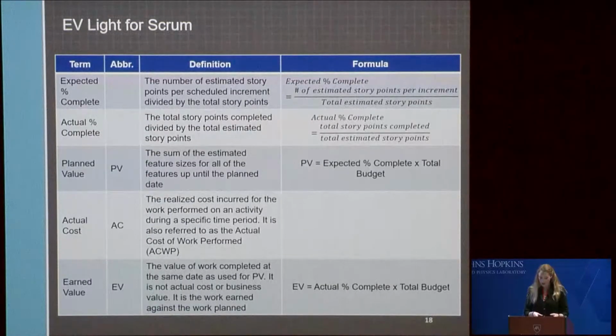However, in order to apply this method, you have to assume that all story points are weighted the same, meaning that one story point is equivalent to another in terms of cost and effort. This, however, may not be the case, as we mentioned previously. Variation across the planning poker teams and the application of story points may increase the variation in the calculations.